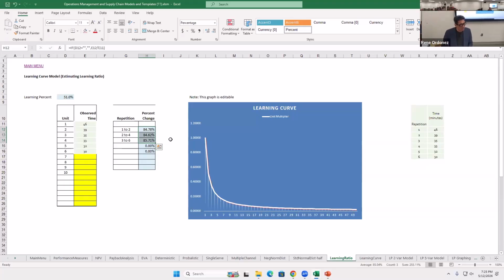And then if you're doing a completely brand new project, you probably need a really low or high learning curve, and then you bring it down as you scale your production. Is that what the real world scenario would be? If it's a totally brand new crew or a totally brand new assembly line, or maybe a mechanic, for example, a new engine, you'll have to observe, adjust your price later on when you've observed several times, because at that point you'll probably have reached some level of efficiency.